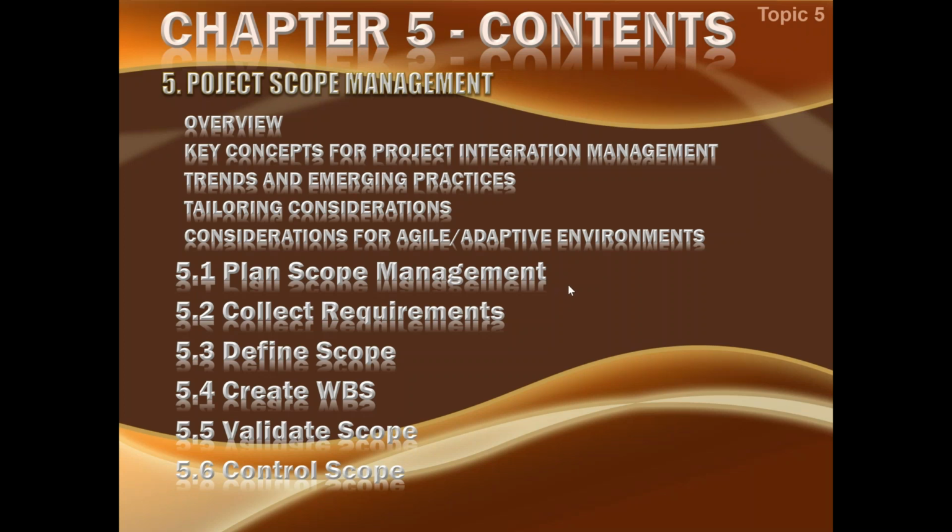In planning, it comes into play in full form because without having planned the scope thoroughly, we cannot move ahead with any of the knowledge areas. That's why scope was to be established, and once we create the WBS and the planning is complete, that is the point where the scope baseline is formed. This scope baseline is then integrated into the project management plan, which will be executed in an integrated way by direct and manage project work.